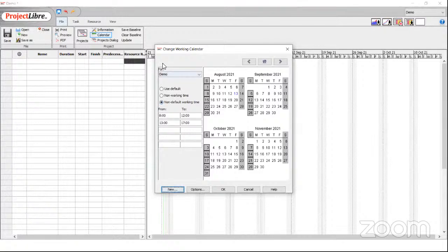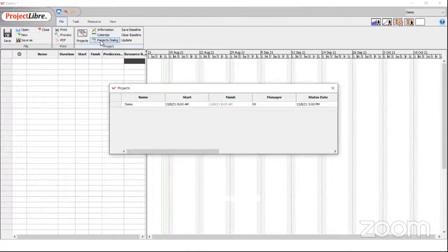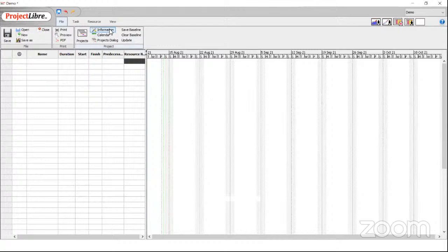Okay, so you see on the left top corner of this box, you see demo. Now in this demo calendar, which is the calendar I'm going to use for my company or for my project, I'm selecting all Saturdays, making it working, selecting all Sundays, making it working, and I say okay, and my calendar is done. Right? Now, it doesn't end there. You have to also apply this calendar to your project. So for that,